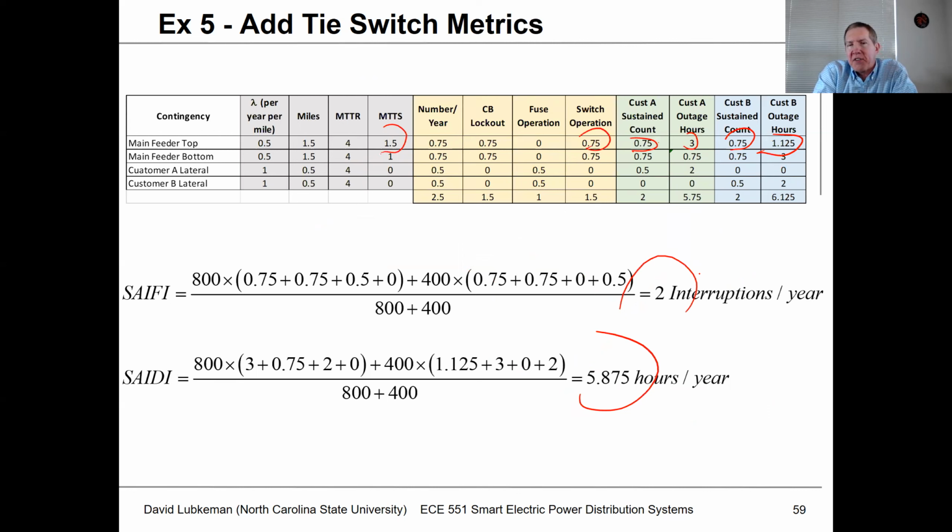And then if you have a dollar number for reliability, and if you can convert the cost of installing the switch to some value that's comparable, then you can compare those two numbers and figure out whether it's worthwhile doing this project or not. So utilities would have thousands of these projects as possibilities, and given their budget, they rank the projects, and then they would start funding the projects according to their ranking.